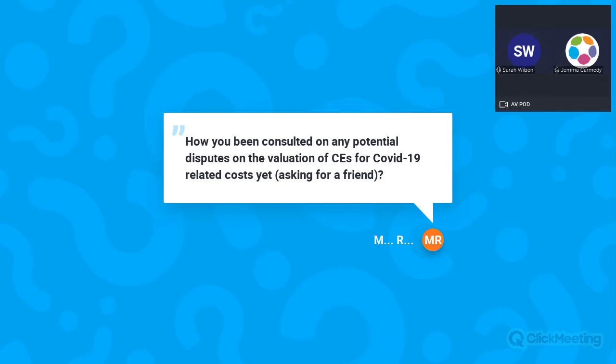So just beware of that. Be a little bit skeptical if you're on a JCT and you're awarded an extension of time for COVID. Just make sure that it is genuinely COVID and it's not that you're entitled to your costs as well. But yes, COVID related costs would be calculated on the basis of whichever, a shorter schedule if you're on options